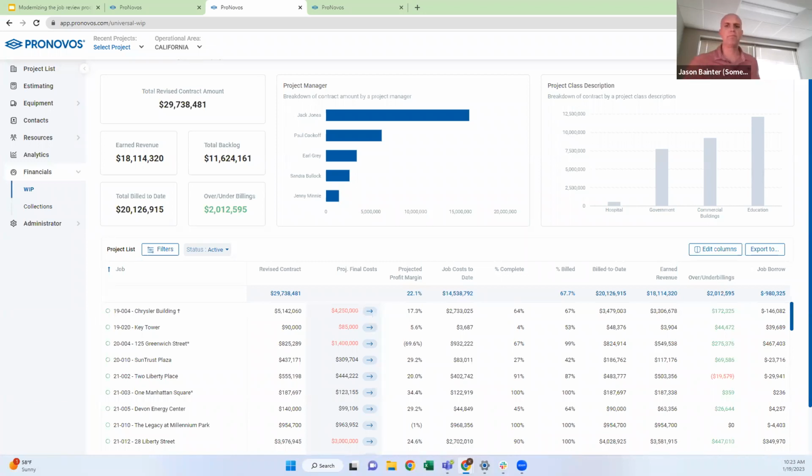And in past webinars, we've seen the money graph or the cash graph, and that gives you a timeline of when costs have come in, when cash has come in, when billings have gone out. And as long as we are seeing cash come in at a faster pace than costs are going out, then we're going to be cash positive, and the client will be cash flowing that job versus the company having to cash flow it.